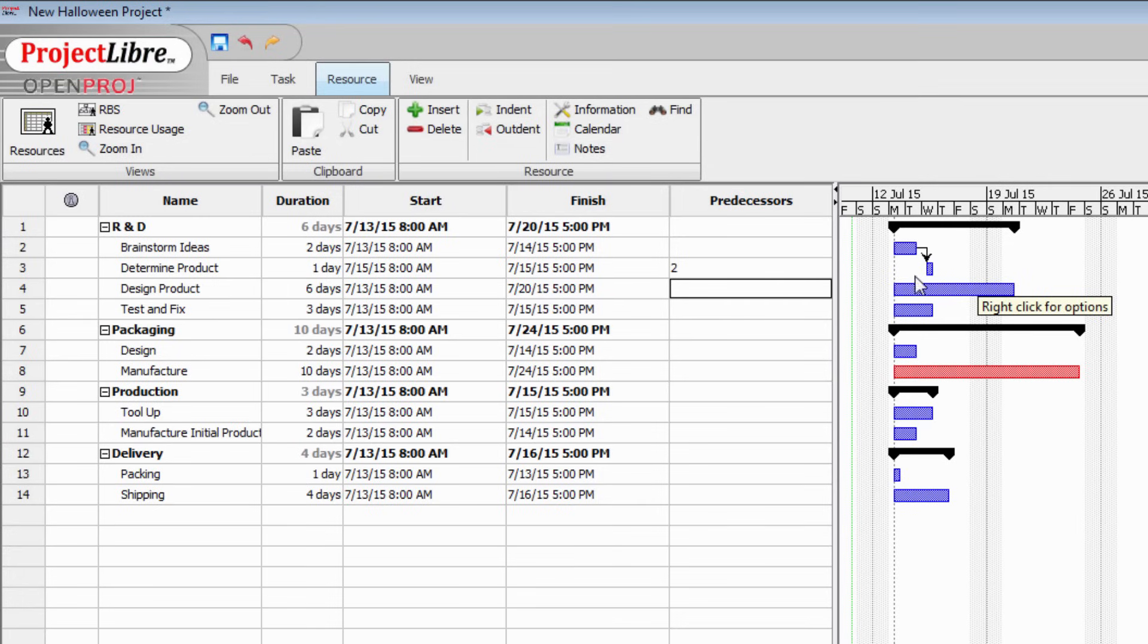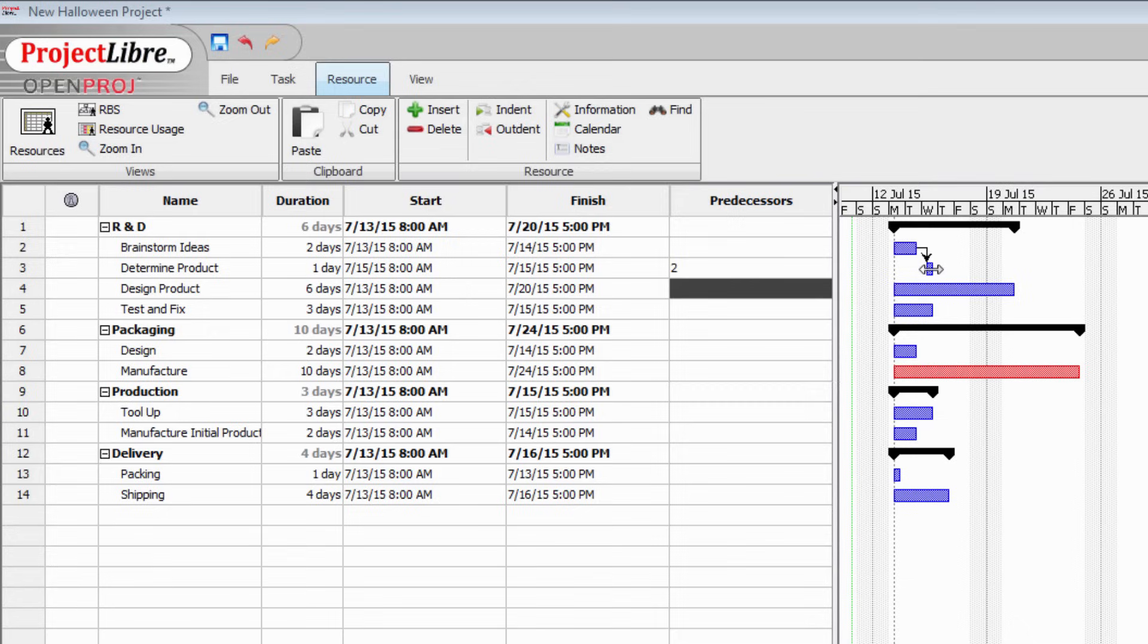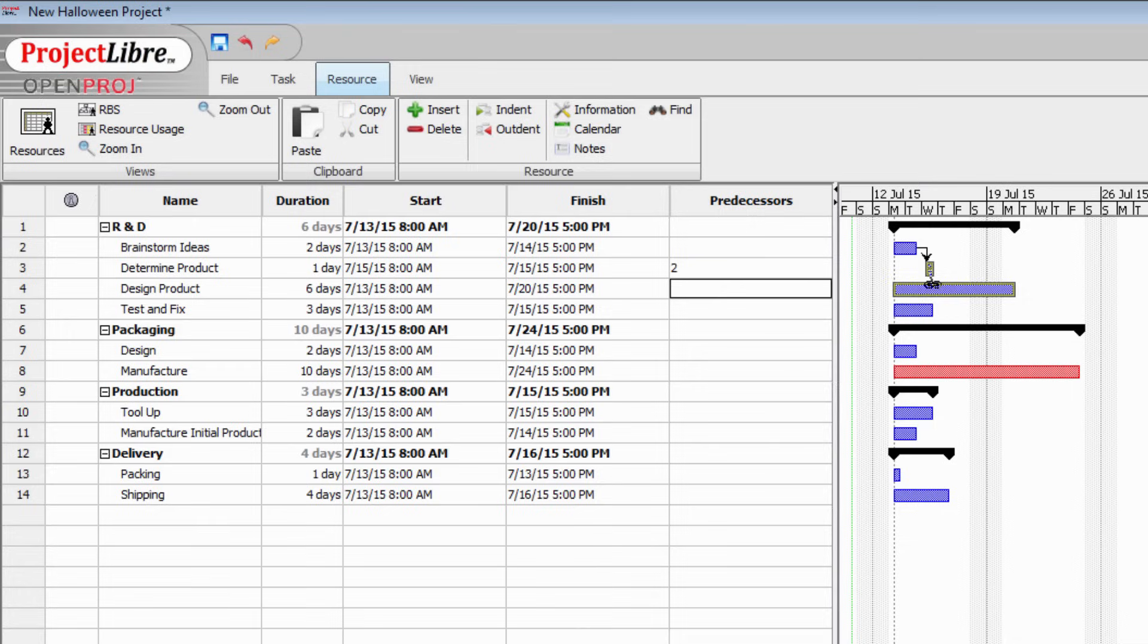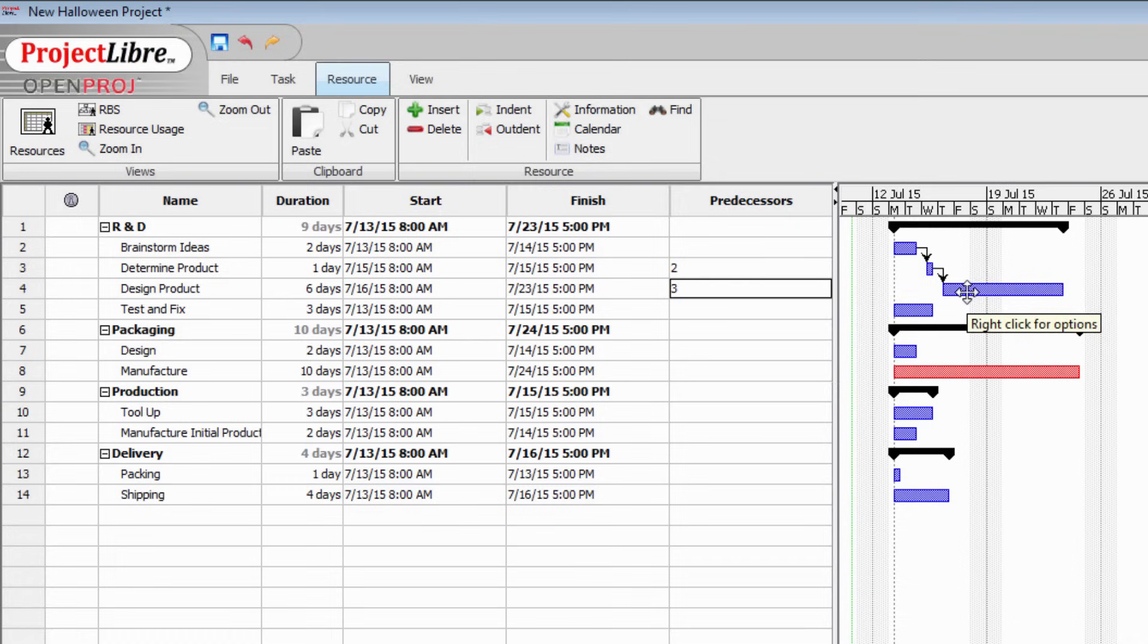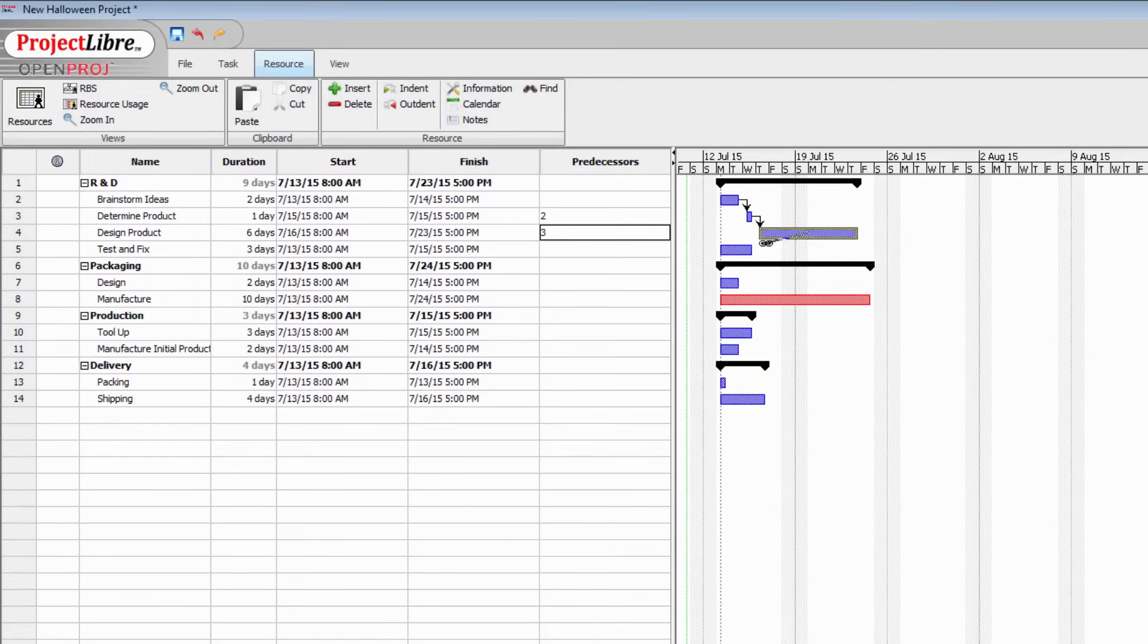This is another one. We can't design the product until we've determined what it is that we're going to be designing. Another way of creating this dependency is just by picking up this box for determining product and dropping it on top of the box for designing the product. And that creates another finish to start dependency. And of course, we can't start testing and fixing the product until we've designed it so we have something to test and fix. Same thing, another dependency.